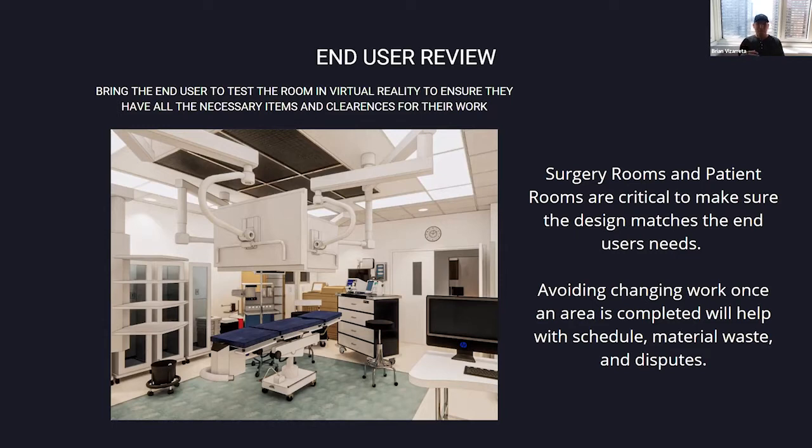This is sometimes an afterthought when it comes to the end user, because it's just, all right, how do we fit everything mechanically? Med gas, et cetera, everything gets put in place. But if it's not usable, it's going to end up getting ripped up anyway. And having to redo work is not necessarily about the money, but more about the time that your team is mobilized on a site. And then obviously there's the satisfaction of the owner, or whoever is the inheritor of the building, that they're happy it got done once. It was preventative rather than reactive.